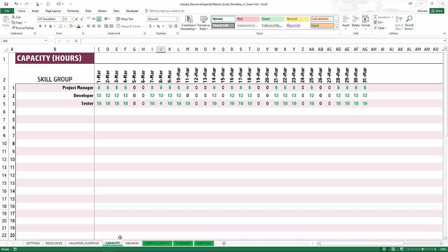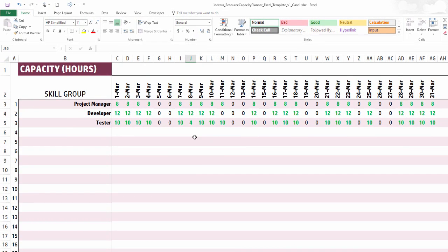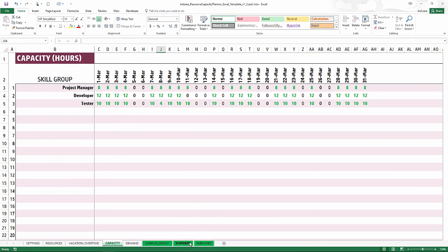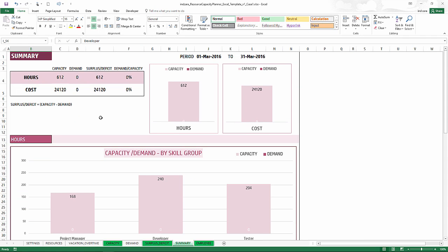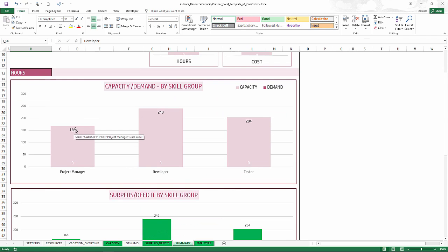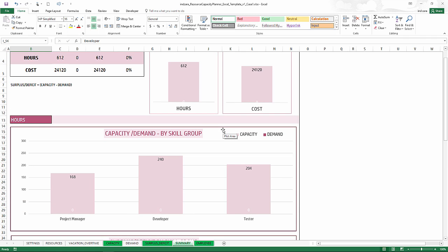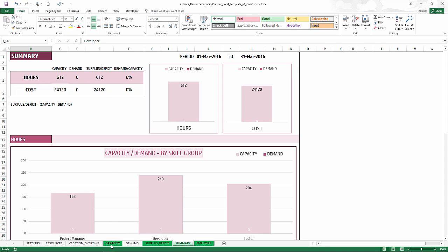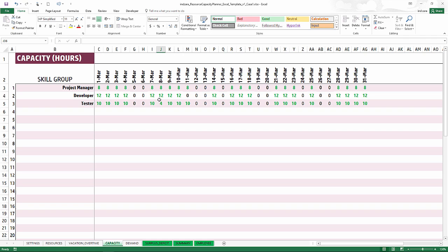Now let's go see the capacity data for our team. This is automatically calculated, breaking it down by day from March 1st through March 31st. On the 15th and 24th of March — which are holidays — there is no capacity, and Saturdays and Sundays also have no capacity. You can go to the summary sheet to get the summary data. We have 612 total hours of capacity, broken down by skill group for the entire month.